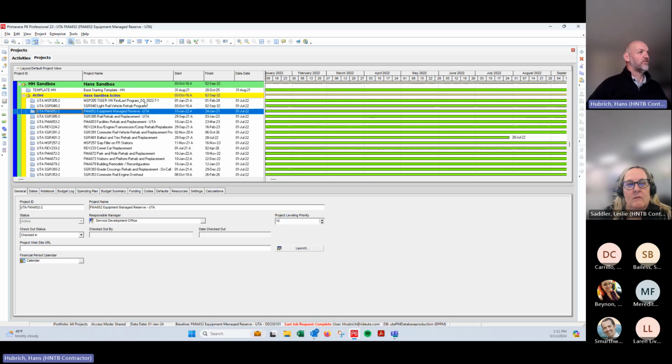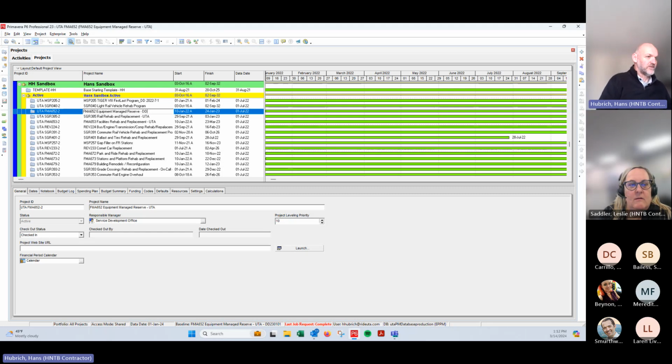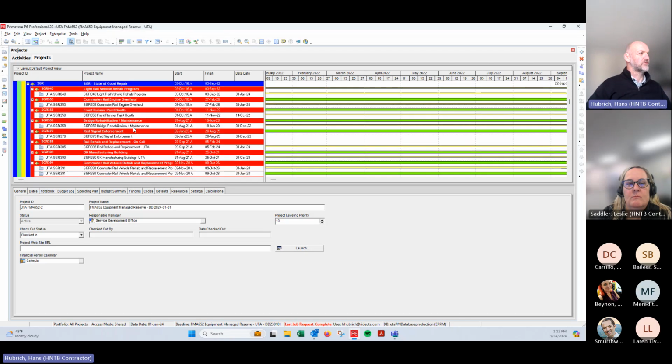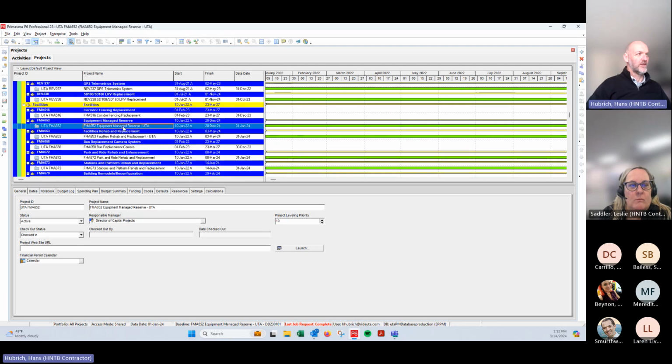So I'll just leave this one down here, this one that I just copied down. And usually if I'm doing a good practice, see how I throw the data date on here? I'll mark this one with my data date. Here's my standard format, 2024-01-01. So now I know this project in my sandbox was the last update with the data date, the 1st of January 2024. And then I will go back up here to the live project, Dave.